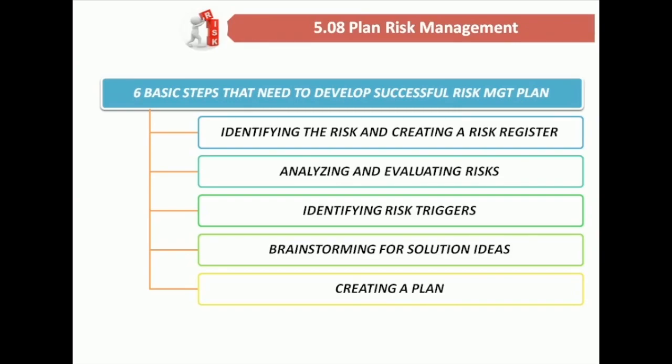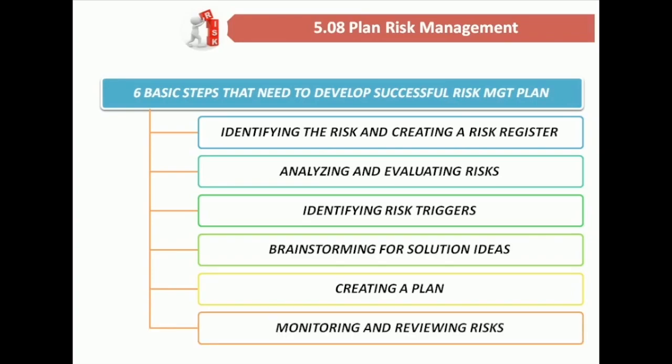The risk mitigation strategies will either reduce the chance of the risk being accomplished or will reduce the impact of the risk at hand. And finally, monitoring and reviewing risks. Since all the proceeds of the project risk management plan are documented in the risk register, it's important to review the document at regular intervals of time. Consider the review period to be fortnightly.